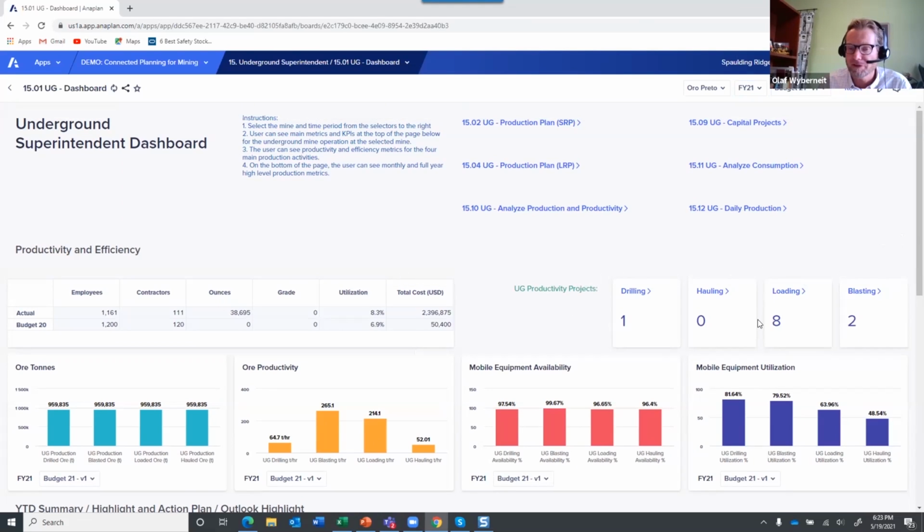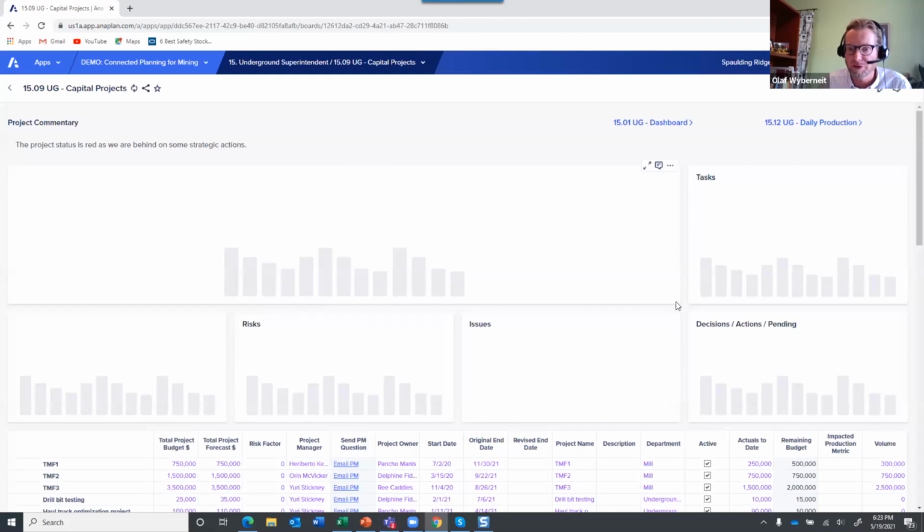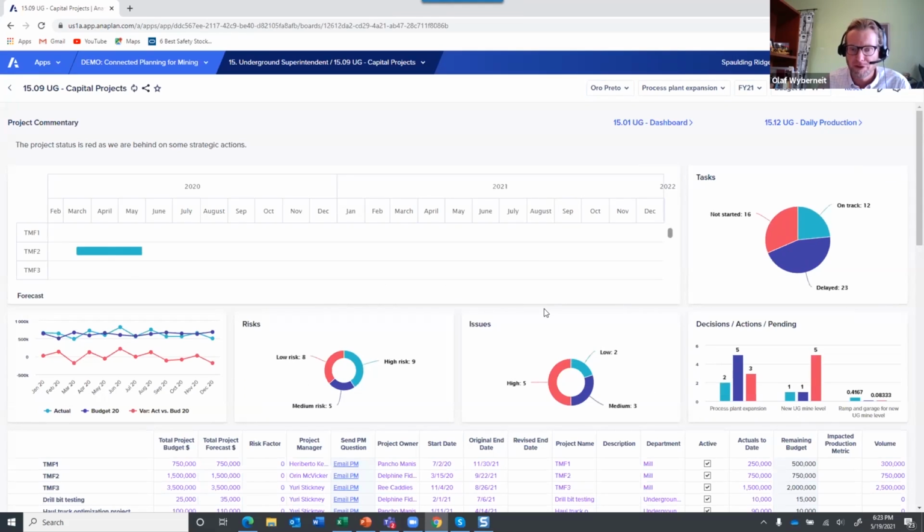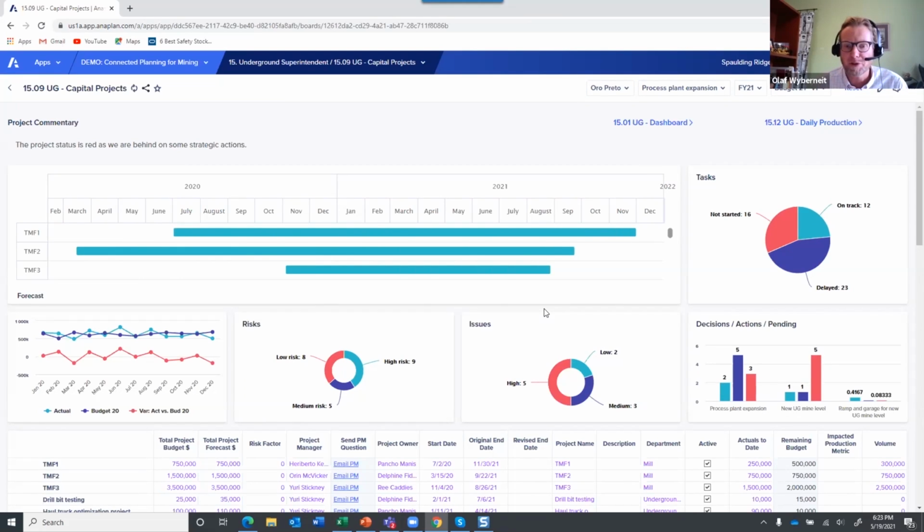So these areas actually relate here to some capital projects. So I'm just going to go forward and have a look at the capital project. Unlike the operating costs, capital projects have all these discrete events, and they don't fall in nicely with the chart of accounts, because often there's a WBS code, but when you're creating the budget, it hasn't been approved yet. So Anaplan is very flexible in showing this information, whether it's deeply codified, or whether it is just